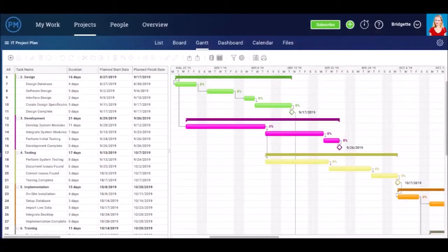The project schedule is an output of a schedule model that presents linked activities with planned dates, duration, milestones, and resources. At a minimum, the project schedule includes a planned start date and a planned finish date for each activity. The project schedule shows the timeline for the needed resources. The project schedule may be represented in summary form, sometimes referred to as the master schedule or milestone schedule, or presented in detail.